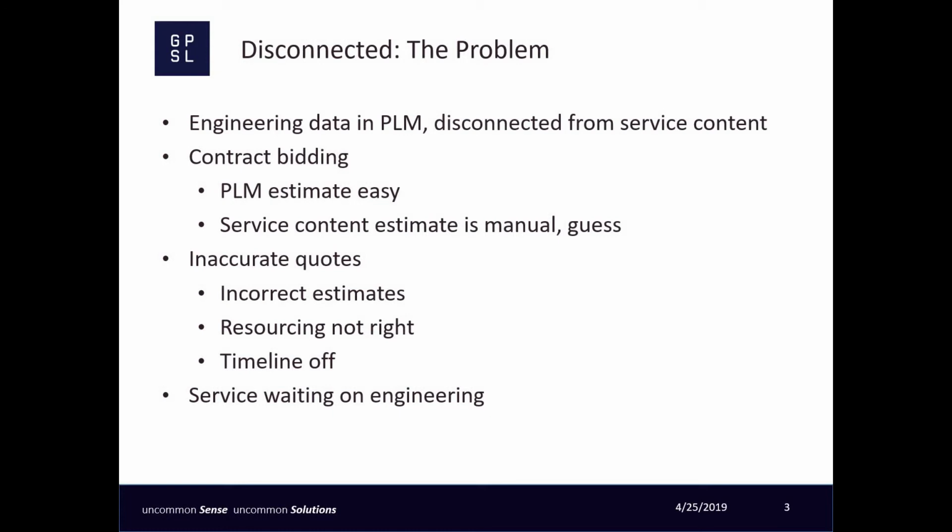The project may look at the existing folders and make an estimate at the document level. This is probably not an estimate they can be too confident in. They might guess 100 work packages only for it to really be 200. This inaccurate estimate then ripples out. The resourcing for the project might be off.